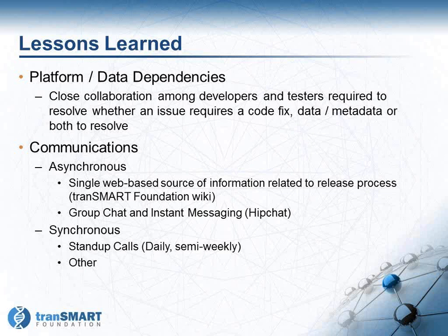Communications, again, as a virtual global activity, communication is key to helping keep things moving forward. And so a single web-based source of information related to the release process was very key. We used the tranSMART Foundation Wiki for that, and we used foundation resources to keep it up to date as a single point of truth during the multi-month process. And then from a developer point of view and a testing point of view, the group chat and instant messaging capabilities that HipChat provides was a key factor in helping with that.